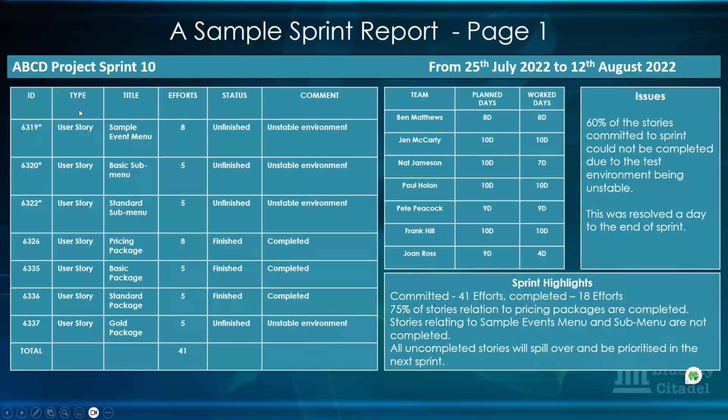You could say the type of work item it is, the title of it, and what effort is on it, which at times also helps to understand why it's not completed on time. Because if you have an effort of 2 and you are saying incomplete, except if there is a blocker somewhere, they'll be wondering, why would you finish a 5 and not a 2? So the effort also goes a long way to explain things.